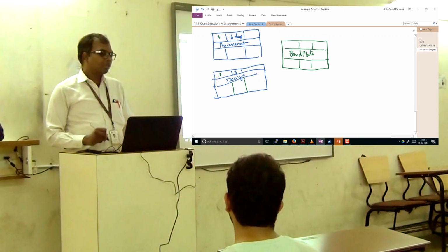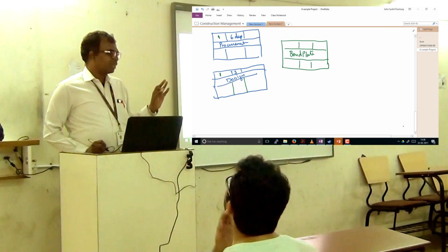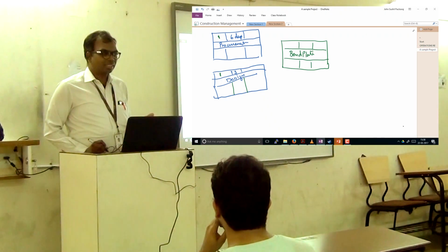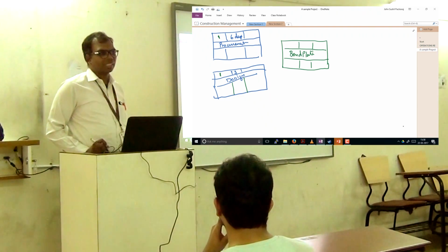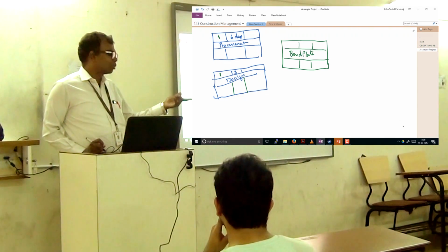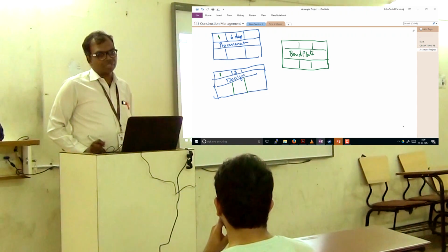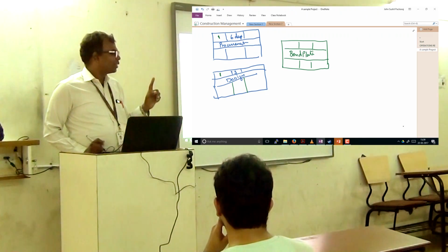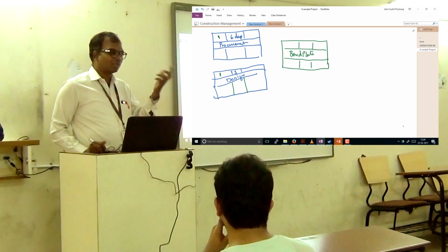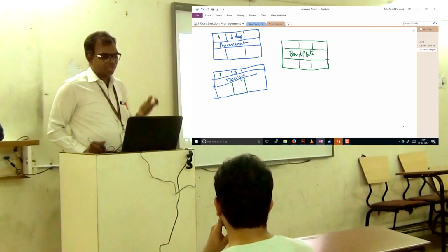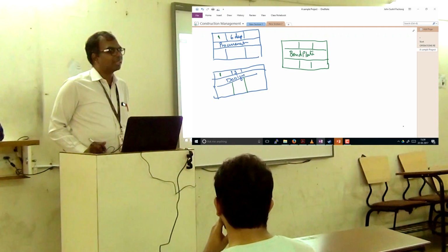Now I prefer to use the calendar method of counting, because that's what the software tends to do, and that is the way you practically work. Maybe you'll find a little discrepancy with what's in an OR book. They may start with 0 and then go on, but I prefer to start with 1 and say that is day 1, or first hour, or first minute. We'll consistently use whatever the unit of time is. So if I'm going with days, when will this procurement activity get over?